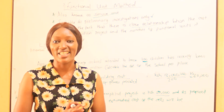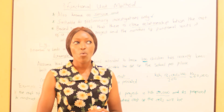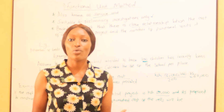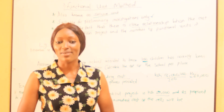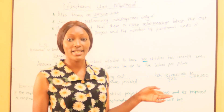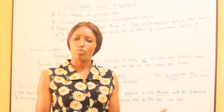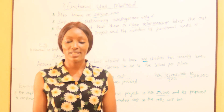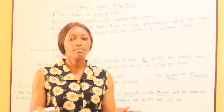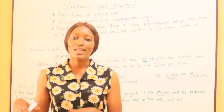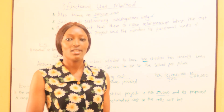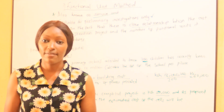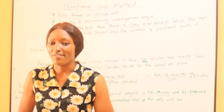As a trainee, you may want to do approximate estimation — for example, someone asks how much it costs to construct a two-bedroom house. What we learn here is that as long as it's a two-bedroom house, you can relate it to another two-bedroom house recently constructed in the same location. Using that cost, you can even approximate a three-bedroom house from it. You just use the number of service units in the building.